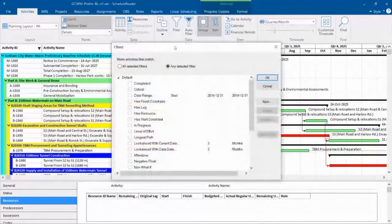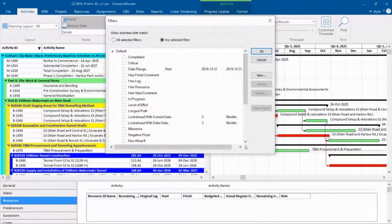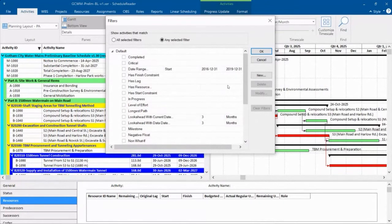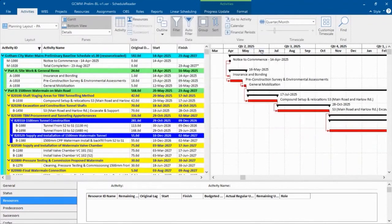But in the filtering area, we've got a lot of really nice things. So the guys at Schedule Reader have improved over some of the default filters that we have in P6. So if I want my longest path or what I believe is the best definition of critical path, the longest path, I'll just check that on.